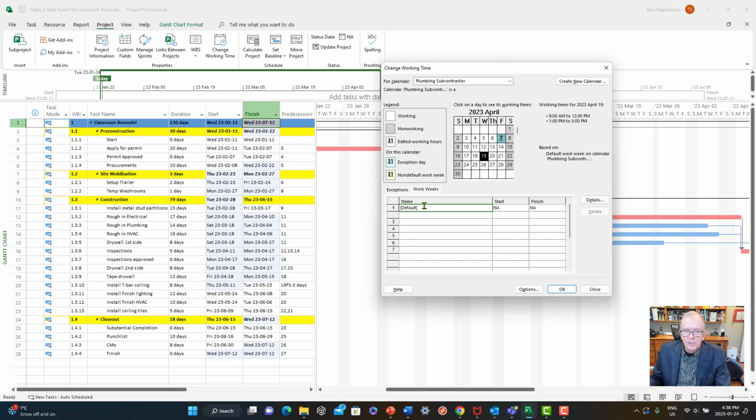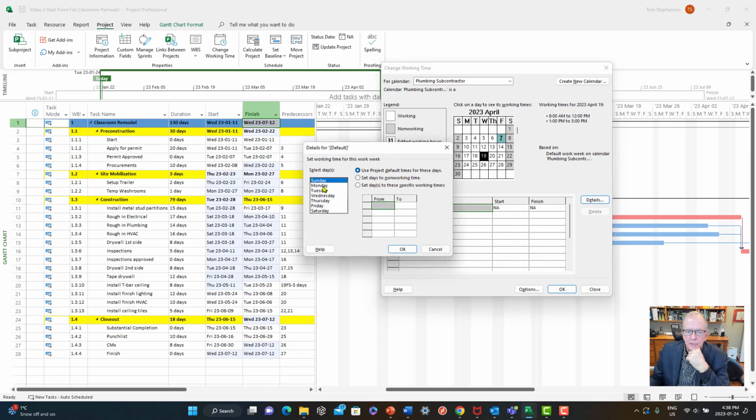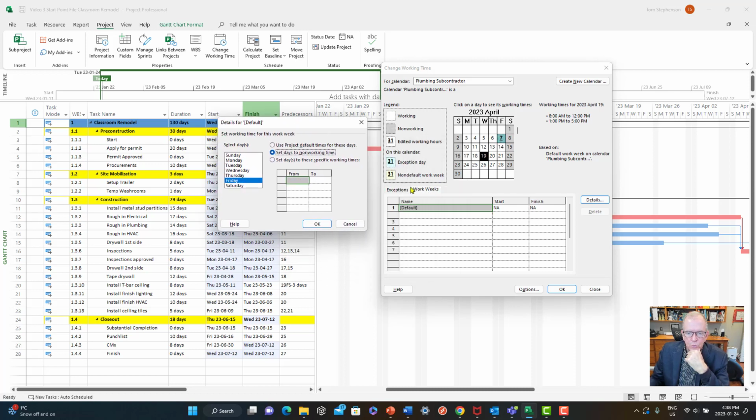Now, let's say in our unionized environment in Toronto, our mechanical contractors typically work a 4-day week. So I'm just going to put here default, and I'm going to say details. And I'm going to say that they don't work Fridays. So I'm going to set Fridays to non-working time. So what's key here is I went to work weeks and I went to default. This means they never work Fridays, right?